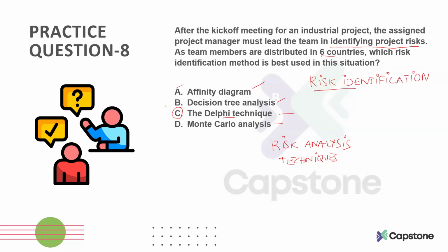So after the first round, the group members see what different responses are coming, and they compare those responses with their analysis, and then they can revise their contributions after looking at the input from others. And this process keeps on going anonymously over multiple rounds till you reach a very close kind of consensus. So this is how Delphi technique works.